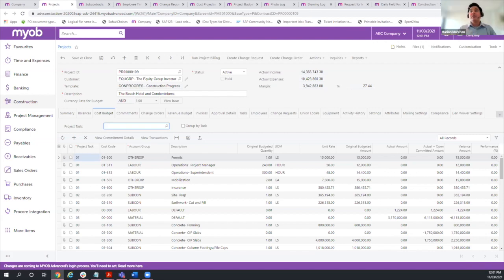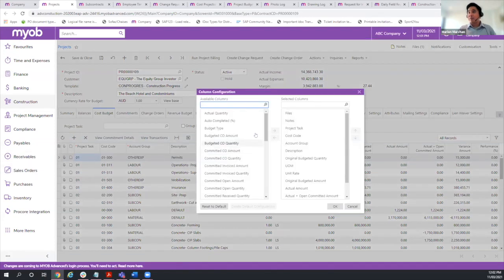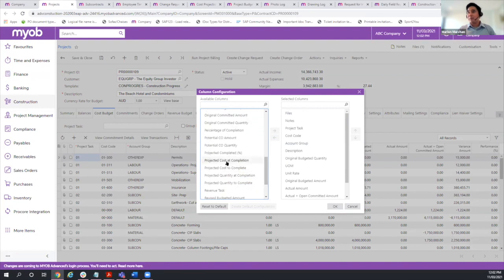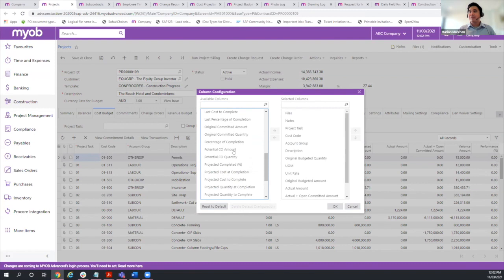Right. And so obviously you're going to be able to set what your original budgeted amount is. If you look at the report here, we have a number of columns that help you keep track across the life cycle. Once you have your original budget, you can track against what the actual costs are. I actually hid some of the columns here, which you can do for most tables, because there's really a bunch more on there. So if you want to keep track of what your projections are, which we'll see later on, or the change orders, so what the budget is. Again, as Leo mentioned, you're able to segregate what your original budget is from what your variations are, and you can do that quickly on here.